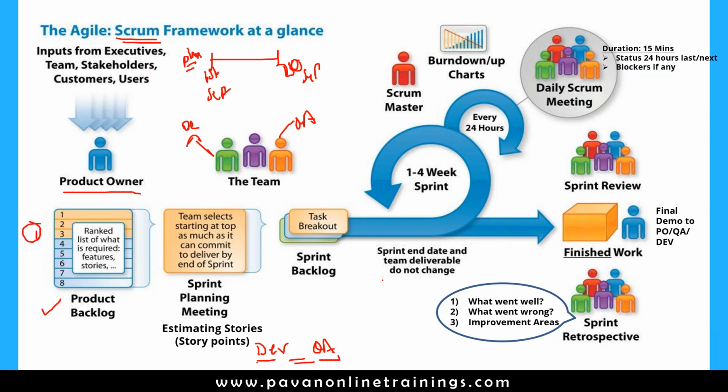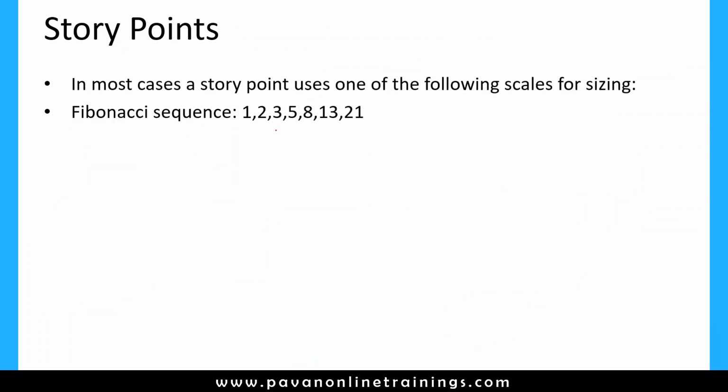Okay, remember this. Estimation is always given in the form of the Fibonacci series. Let's say 1, 2, 3, 5, 8, 13, 20. This is called a Fibonacci series. These are not representing number of hours. These are not representing number of days.